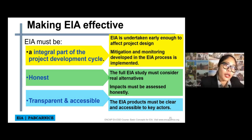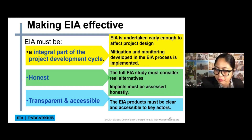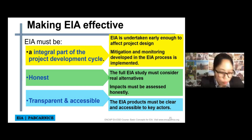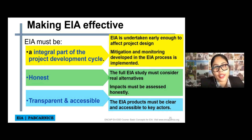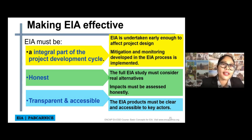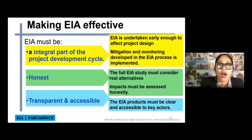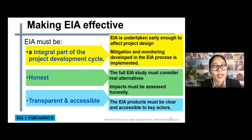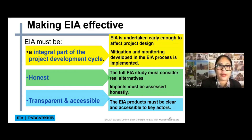If there are environmental impacts along the way when the project is already in its implementing stage, and those impacts were not studied or predicted during the EIA study, then that specific impact should be integrated into the EIA or into the mitigation and monitoring process, even if it was not included in the full EIA study. If that is the case, it means the EIA was not studied well enough because you were not able to predict that specific potential impact.